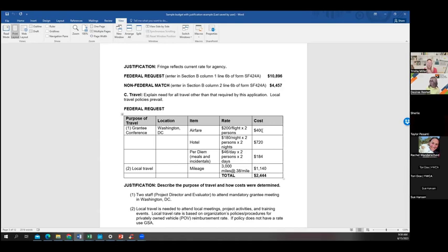Here's what we've spent. Have you used your variance analysis? Can you see where there's going to be adjustments? What if airfare for the last 3 times you added this was only 200 and now it's 400? Like if you documented and if you looked at your variance analysis and if you checked the airlines, right, at the time, you would know that this part would need to change, okay? So that's how you get yourself into being able to do what you say you're going to do for the next year or the year after that, or however you budget it, okay?